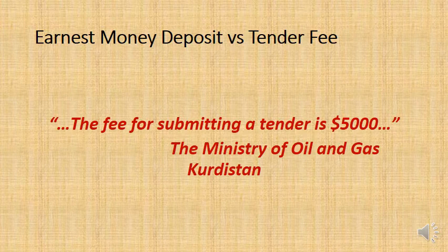Instead, they will have a tender fee. So the Ministry of Oil and Gas, in most of their tender documents, if it's a 100,000 plus project for the contract, they will say this: the fee for submitting a tender is $5,000. That means that if you want to bid for the work, you have to pay a price. You have to pay a fee.